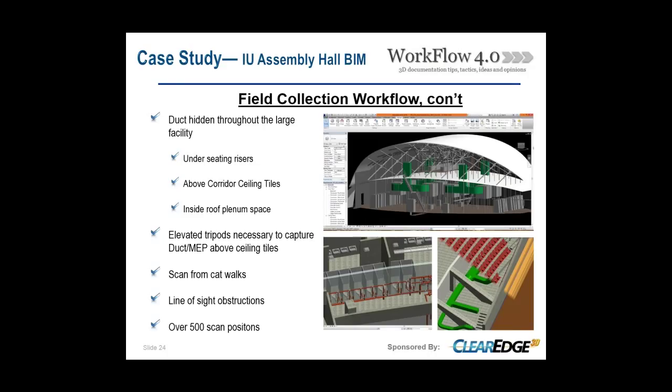I know Chris made a comment earlier, which I completely concur with. We took probably more scans than we needed to, but with limited line of sight, it was really paramount that we did that because we couldn't get up close and personal with a lot of this stuff. We had to scan it from a distance. So that was how we did this. In all, we were just a little over 500 scans to complete the laser scanning field data collection for a job like this.